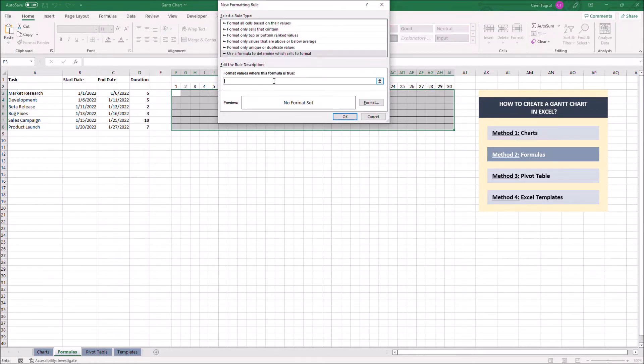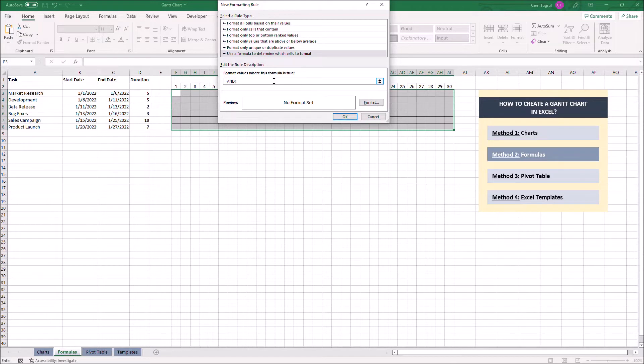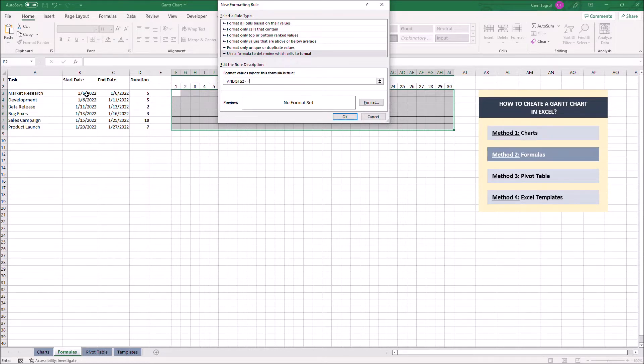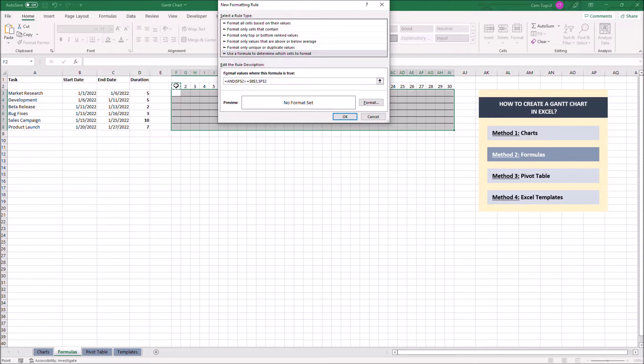Here we use the AND function to add the duration bars. Let's add this date greater than or equal to the start date, this date less than or equal to the end date.